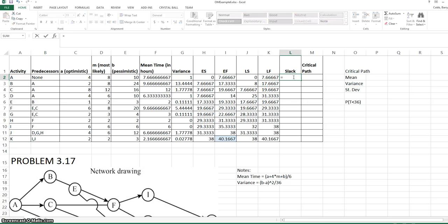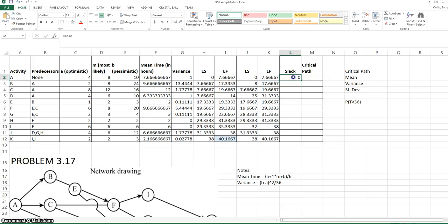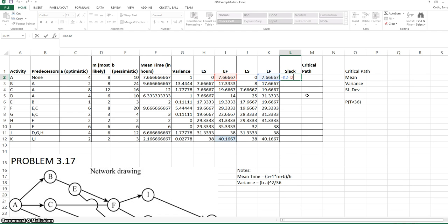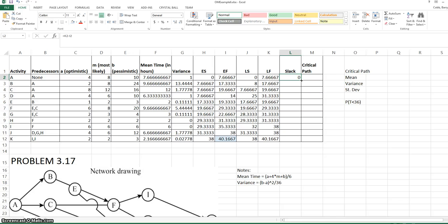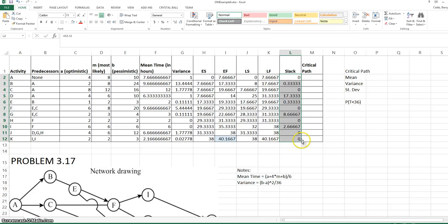The slack will be the late finish minus the early finish. And this will be true for every activity, so once we enter this for the first activity, we can copy it down to the remainder of the cells. I copy these by just simply clicking in the bottom right corner, and it will copy it down as far as it sees data in the adjacent cells.